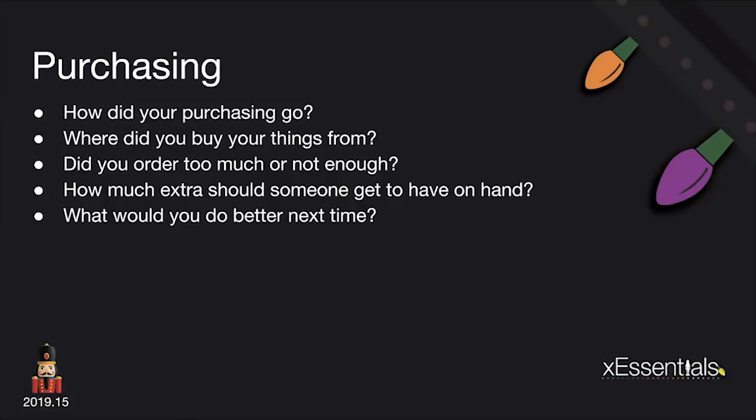So I waited, and by the time the sale came, the discount that I got wasn't really worth the wait. Yeah. So getting your stuff ordered as early as you can, so you've got a lot of time to start putting things together. Because if you wait until summer, you're doing a lot of stuff last minute, and it could get behind schedule, and then you're really struggling if you run into trouble during setup.